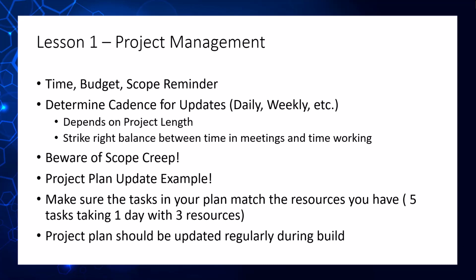So when it comes to scope, typically you'll start to see the application and you'll get excited and you'll find other use cases for it and say, oh, how can we do this or can we do that? And in that case, your scope will increase, which will also increase the time and the budget. So just try to keep scope as tight as possible. If you do come up with other ideas along the way, just put it on a list, for an enhancement list, for a phase 1 item or a phase 2 item, etc. So that way you can continue to march towards your original plan over here.